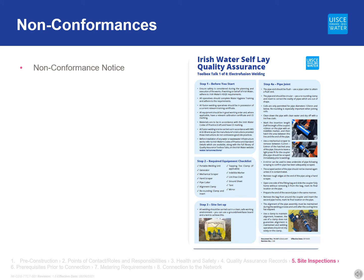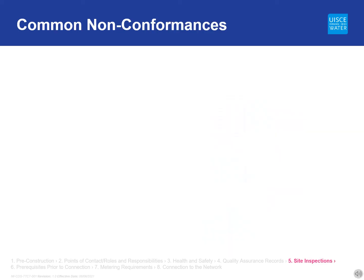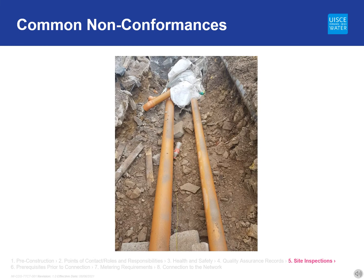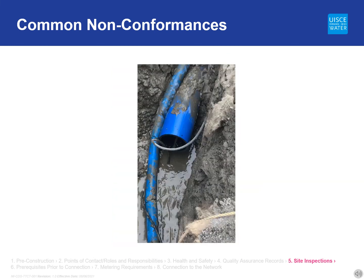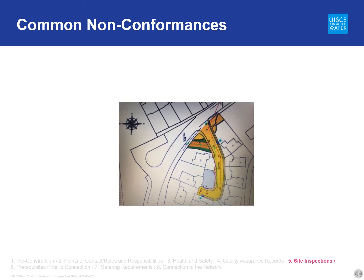A non-conformance notice will be issued by the field engineer to the developer, construction engineer, and design engineer when a non-conformance or failed test is found on site. The developer will have 5 days to respond to the notice detailing what remedial works will be carried out. The field engineer will then conduct a close-out inspection to ensure compliance with codes of practice. Irish Water has a full suite of technical guidance documents including a library of toolbox talks which address common non-conformances, available on the Irish Water website. Some of the most common non-conformances include non-compliant materials, separation distances, non-compliant bedding and backfill material, contaminated pipes, poorly constructed valve chambers and manholes, damaged materials, and issues relating to way leaves and easements.